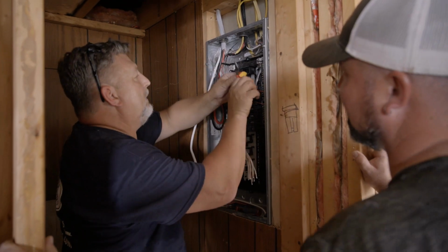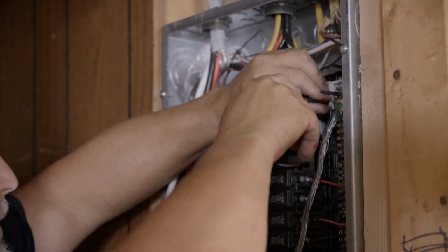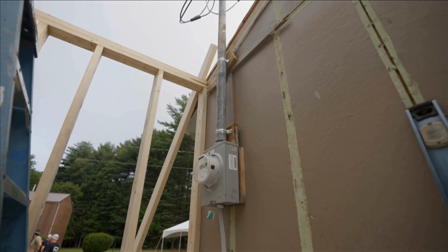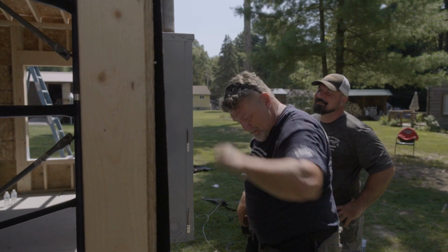As with any renovation, there's always going to be a hiccup. There's always going to be something to trip you up a little bit. Well, we got a pretty big trip up when it comes to the wiring, and especially the supply wiring to this house. We want to give them the ability to even add more on, but they only have a 100-amp panel in there, and that limits you greatly, especially if they dig a well and put their own water supply in, then they're going to need more panels. So we have to move the whole supply, the meter box, and everything else. And the supply chain that's going on today, logistics is a nightmare, and we cannot find what we're looking for. But as in the small towns that we love, the small businesses is who we turn to save the day.